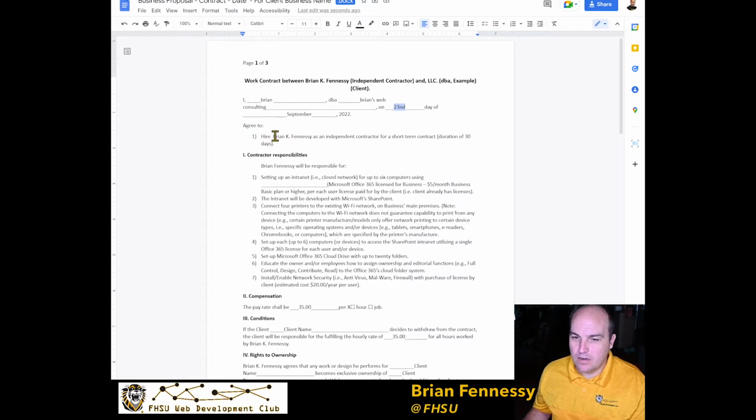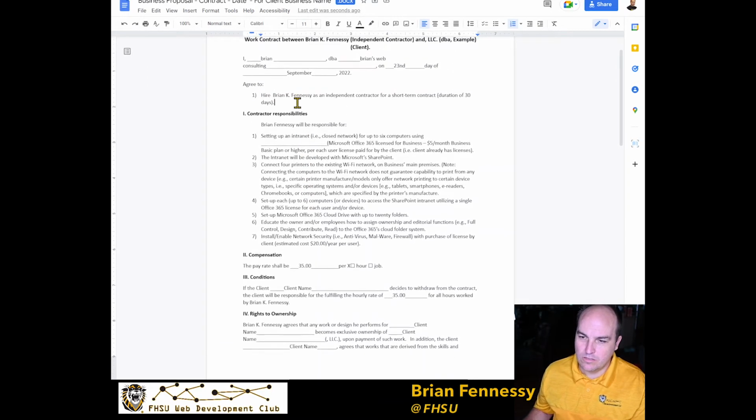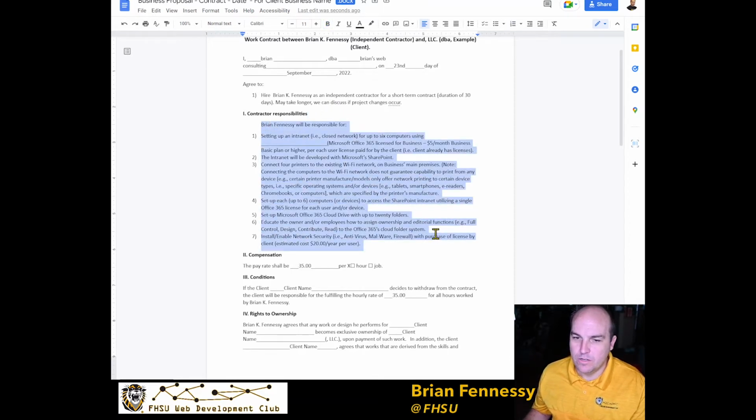Agree to, and then hire Brian as an independent contractor for a short term of 30 days. And then under this, you could also say something like it may take longer. We can discuss if project changes occur, such as they want to add things to the project that you didn't account for.